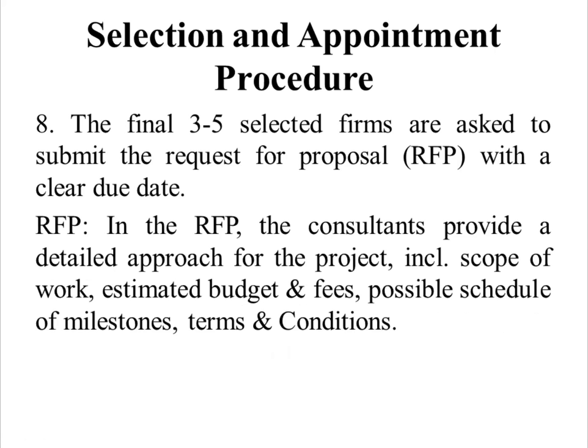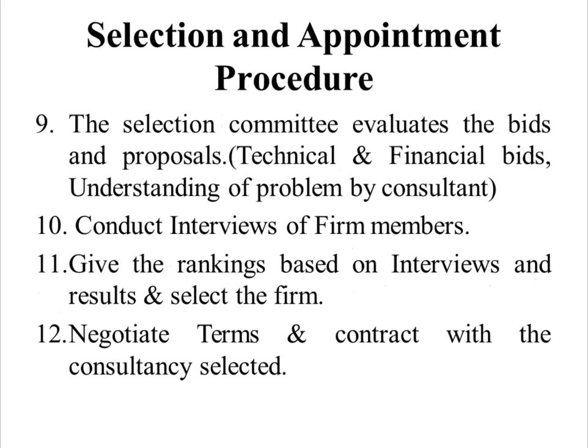The final 3 to 5 selected firms are asked to submit a request for a proposal with a clear due date. So what is a request for proposal? In the request for proposal, that is RFP, the consultants provide a detailed approach for the project, including the scope of work, estimated budget and fees, possible schedule of milestones, terms and conditions, if any.